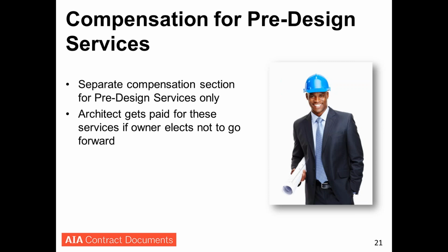And so we created a separate compensation section for those pre-design services. And if you terminate the project, so be it. As I mentioned, there are two separate pieces in Article 12 now. One is for the pre-design. The second is for basic services. And then if you're familiar with AIA agreements, there's the compensation for additional or supplemental services, and it goes on like that. But it's unique in this regard.